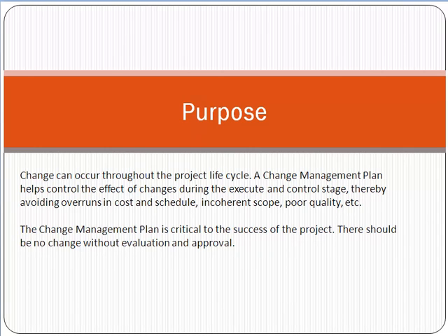If the senior management or change control board approves, only then this change would be implemented in a project and the project baseline would be revised. So it is very, very important that the change should be implemented with proper approval. It is not possible that only one person says it verbally and we make the change, because change always has some impacts on the schedule, on the cost, on the time as well. So it is very necessary that each and every change should be implemented with proper approval.